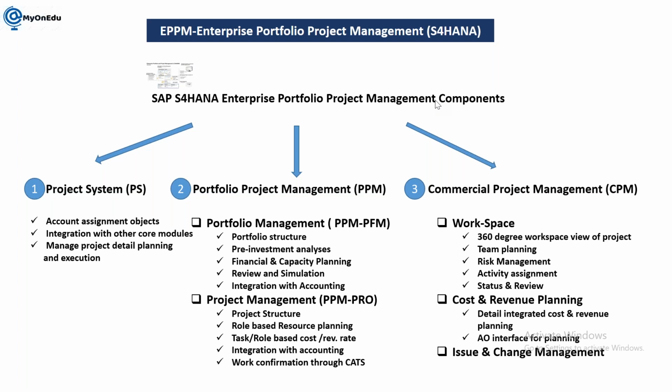You need to analyze both options. The second thing, you need to understand the investment we are going to make in each option, in how many years it will start to give a return, what is the success factor of this project, what is the NPV, net present value, of the amount I am putting in. These different things combined we call pre-investment analysis.